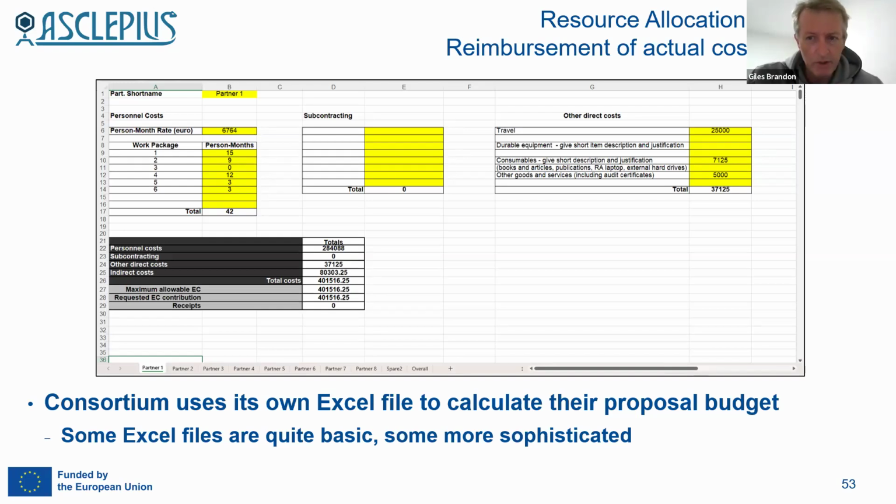I normally need to go through and do a bit of harmonization or redistribution of person months across the work packages, so there's no extreme. For example, for the number of person months for project management, I make sure that we're not outside this 5 to 7% range. Likewise, for the work package on dissemination, I might do a bit of massaging there. Often I see travel budgets where some partners ask for what seem to be far too much, some far too few. I do a bit of juggling there so that there's a greater balance, this kind of thing.